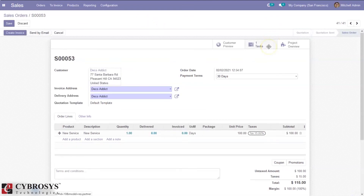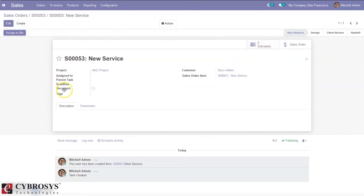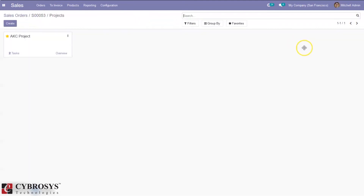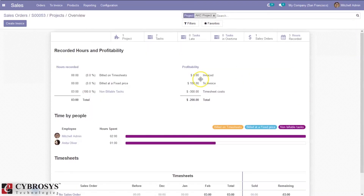When you confirm the sale order, you can see one task was created with the name 'New Service' and the sale order reference. Now if you check the project overview, you can see the total amount to invoice is 100, and the total profitability has increased to negative 200. You can also directly create the invoice from here.